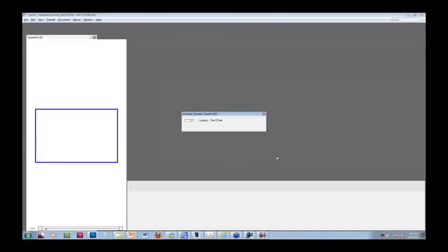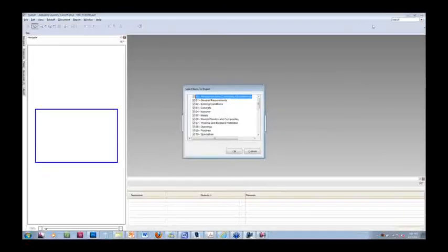The project is complete. So I hit open, and the first thing you'll see is that it translates, first of all, the catalog. So this is the catalog that I was telling you about. It pretty much lists a category, which is called group, and then within the category you have assemblies that have a price and list of items like exterior walls, and then within exterior walls you may have your CMU, whatever type, your concrete walls, whatever type, and then it's just a matter of mapping.